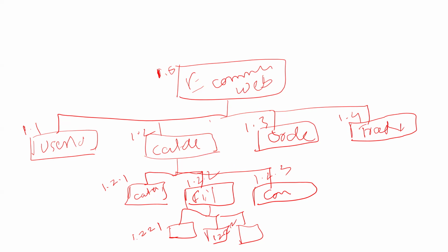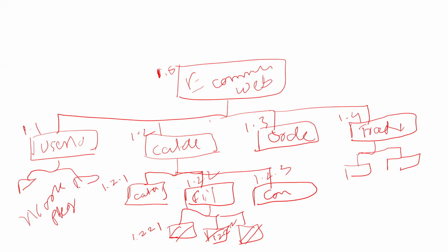Yes. This last part here is the only thing which is a deliverable, friends. Now, for tracking, maybe it has only one more level here. This last part is called a work package. It's a work package. Clear? Remember, user login is not a work package. Underneath it there would be something that is called a work package. User login is just the logical grouping of sub work packages. Is that making sense, friends?